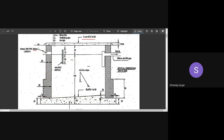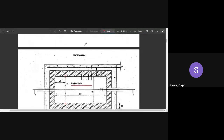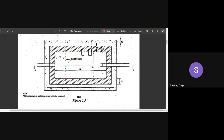The plan view shows the PCC bed, the first wall step (20 cm thick), and the second wall step (30 cm thick) as rectangular sections from the top. The in-to-in distance is 200 cm by 90 cm. The distance from inside the wall to the outside edge of the bed is 40 cm on all sides. All dimensions are in centimeters.